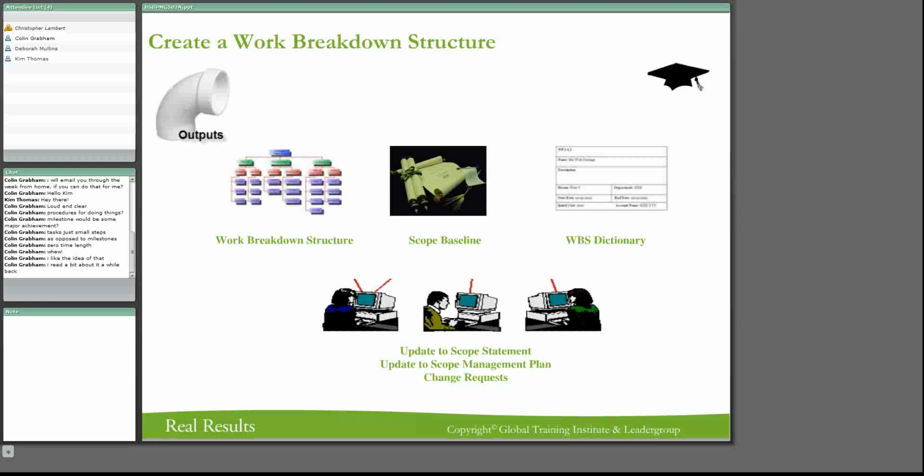So in the project, we didn't define the detail of the activities in the phase. We had 3 phases within that one, and we only defined each phase as we got to that phase. So that's often how projects are done, and a rolling wave is often a good way to do a lot of projects.